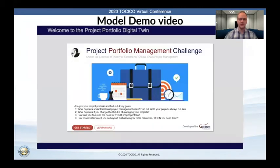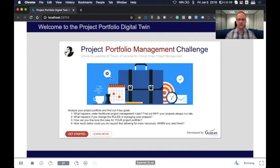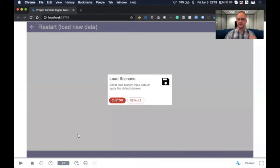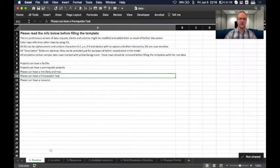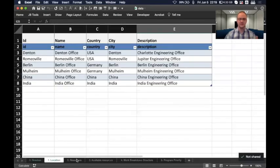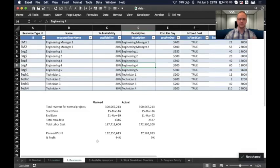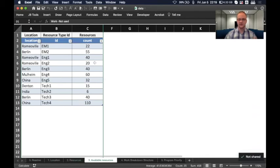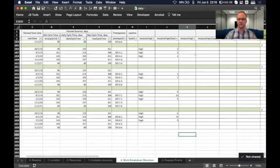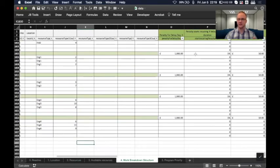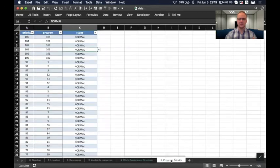So now for a quick demo of the simulation model. When you first run the model, you can learn some more information about the model, but for this demo we're just going to get started. The model will ask you whether you want to upload your own project portfolio or use the default file. A quick review of what the Excel file looks like: we've got separate sheets for the different locations, all the resources, the resource counts, the work breakdown structure in detail containing prerequisites, the number of resources used, the bonuses and penalties, as well as the program priorities.